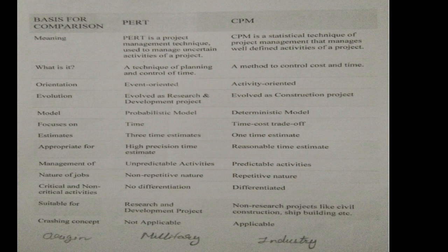The next criteria for difference is the crashing concept. The PERT method will not include any crashing concept, but in CPM crashing is applicable. The last difference is regarding origin. The PERT method is oriented and originated especially in military projects. On the other side, CPM originated in industry projects. As we know, CPM was introduced by DuPont Chemical Industry.